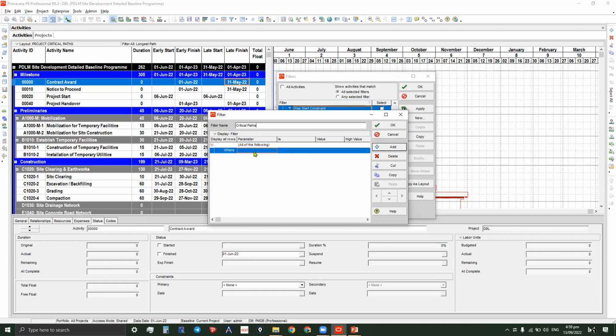Okay. And then here, excuse, we'll select for the total float. We'll look for the total float, and it depends on your threshold. You have the selection here, but mostly we usually use 0 as the limiting point. When it is less than 0, it is critical, and when it is equal to 0, it is on time.